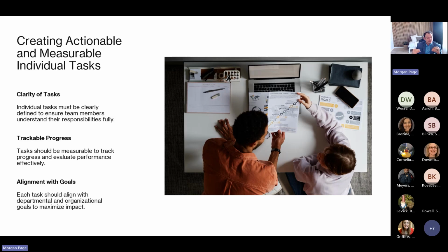That's a good task that's assigned to someone, but it lacks the measurability to track progress. When we're talking about a tool, someone needs to be able to update whether they are 0% done, 20% done, 50% done. What are the components of that task that are success criteria? What makes it successful? That's where I often say, hey, add some bullets to it.